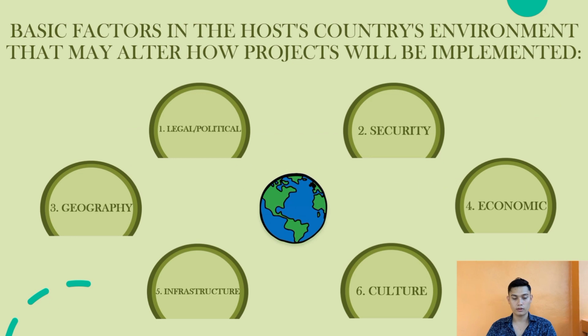When preparing for an international project, a project manager must do due diligence, or in other words, they must research the country or countries that the project might take place in. There are several host country factors that can impact or influence how a project is implemented. Those factors are the following: legal or political, security, geography, economic, infrastructure, and culture.